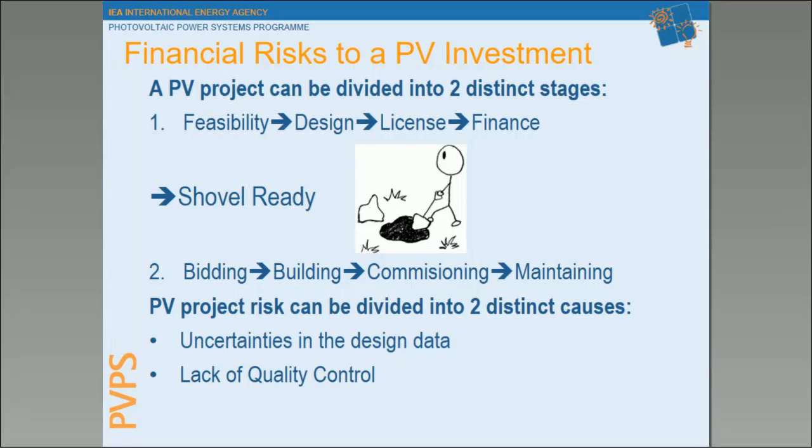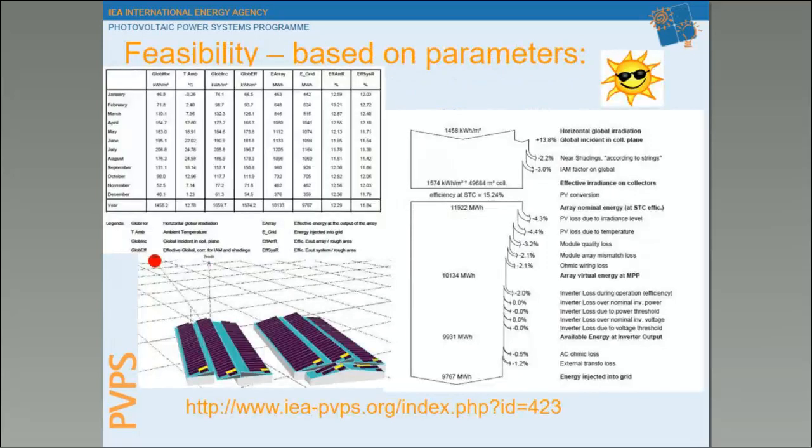During this time, projects often undergo changes in personnel, sometimes even ownership. When the project comes out of this timeout, it is important to ensure that the initial design and design parameters chosen during the first phase are adhered to or properly recalculated for the second phase.